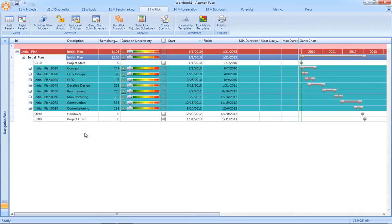There is the underlying schedule basis, there are uncertainty ranges, and risk events that impact the schedule. Once the sound basis of schedule has been established using the likes of Acumen Fuse, we can then take that schedule and apply both the uncertainties and the risk events.